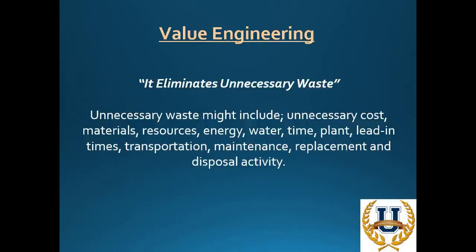You can significantly reduce time through the value engineering process, through availability of materials, through construction methodology, the plant that you use, the lead-in times, transportation, maintenance, replacement and disposal activities. There's an almost infinite array of options for you to consider and engage the design team with when looking to value engineer a project. So in the next video, I'm going to really get gritty down into the process of how you value engineer a project and how you add that massive value to your client. Look forward to seeing you there on video 3.